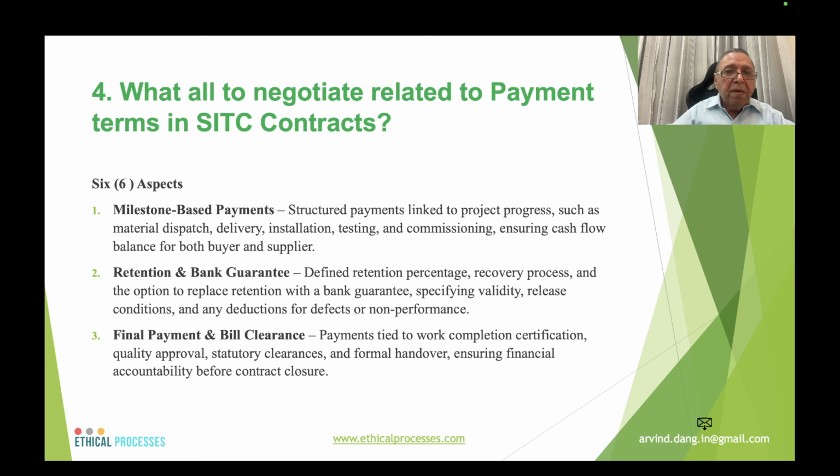Milestone based payments, structural payments linked to the project progress, such as material dispatch, delivery, installation, testing, and commissioning, ensuring cash flow balance for both buyer and supplier. This is very important. It should not be just linked to the time plan, time based, or monthly payments like